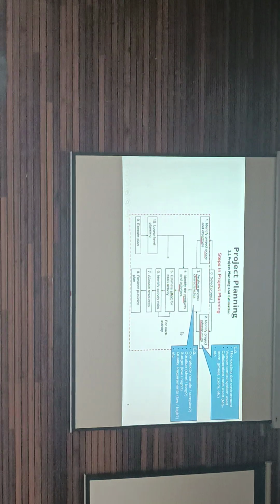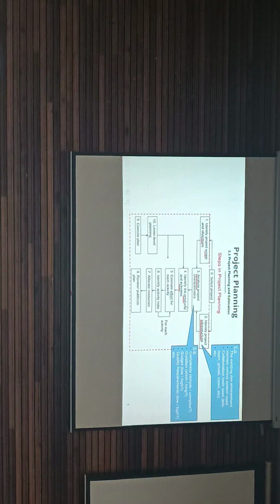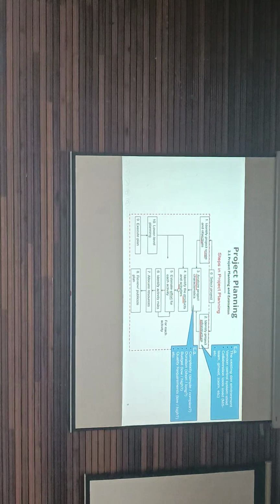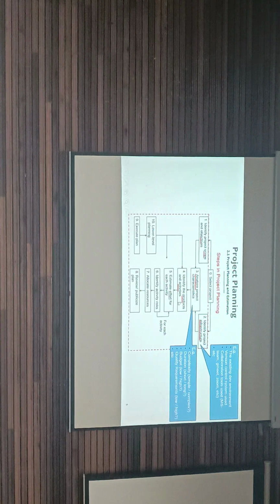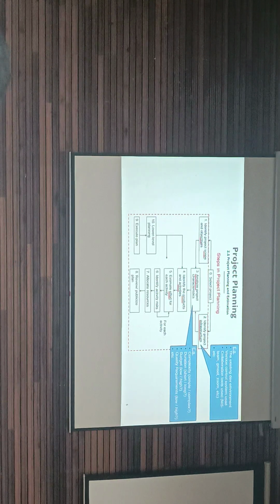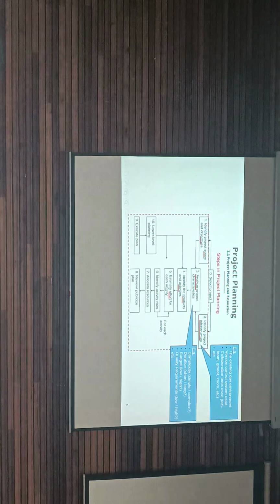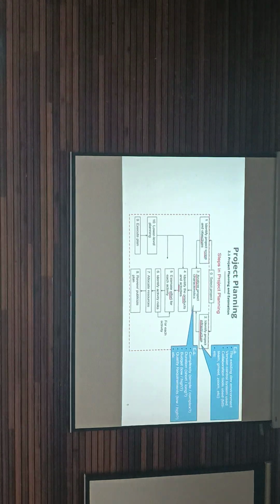Identify products and activities. Products are what you will deliver to the customer, and activities are what you need to carry out to produce the product. Estimate effort for each activity. Effort can be in terms of number of people and number of days.